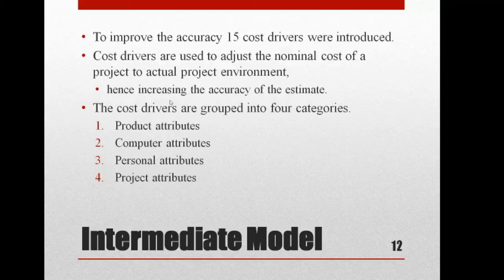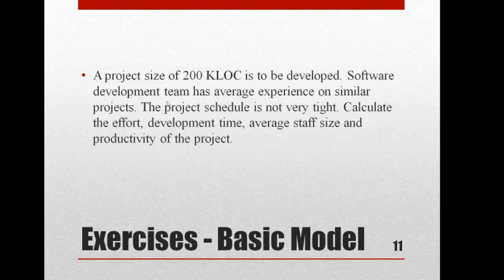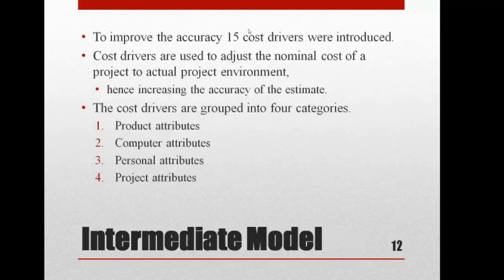In the basic model they haven't taken these into account. They have some accuracy, but to improve that accuracy, they have introduced 15 cost drivers. What are cost drivers? Cost drivers are used to adjust the nominal cost of a project to the actual project environment. So they are converting the nominal cost of the project to the actual project environment. If you include these cost drivers, the cost estimation accuracy can be increased. So what are those cost drivers? Let us see in detail one by one.